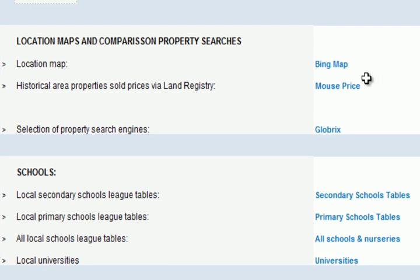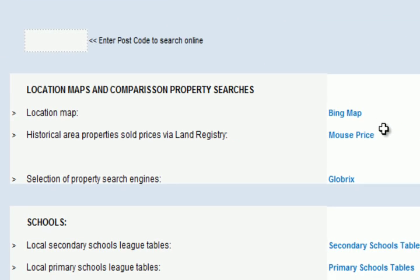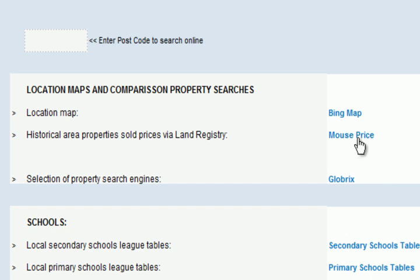We used the online resources for the Land Registry — a website with a list of all properties sold according to the postcode we used. It gave us the exact amount each property sold for and when. We also used the online search tool to look at similar properties currently being marketed. Between those two sources we started to get an idea of how much a four bedroom detached house could be worth in the current market.